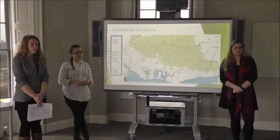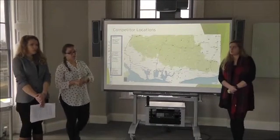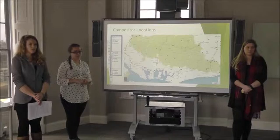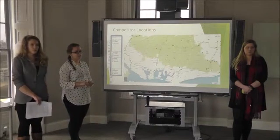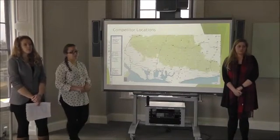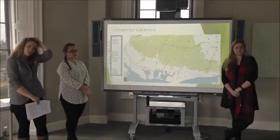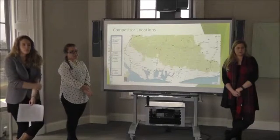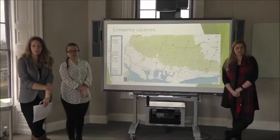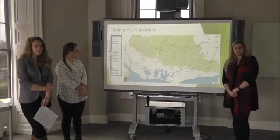So if we were starting now, when do you think you'd be open? Well, I did say July. It's July, August 2016 at the very, very earliest to get this to the quality that you need. It'll take you a good 6 months, if not longer, to get this thing running and up to the level that you want. It always takes longer than you think. You could easily turn around and say it's Easter 2017. If you're being really safe, it's Easter 2017. And if we get it right, it's Christmas 2016. Well, I thought their timeline was 17 and a half years. It was in August. But this is what we're aiming for. Okay?